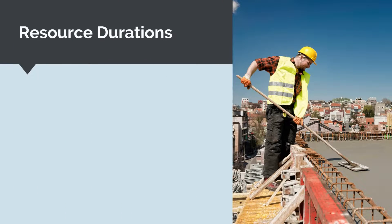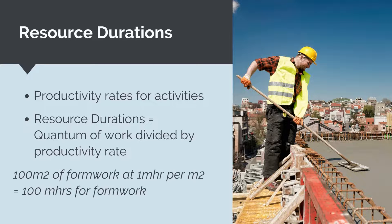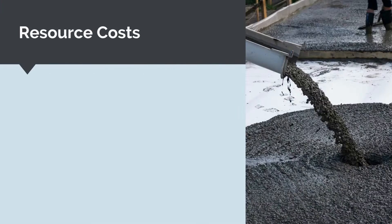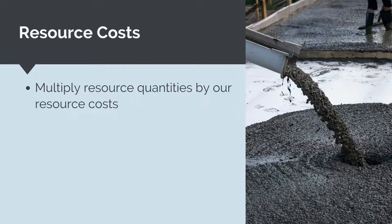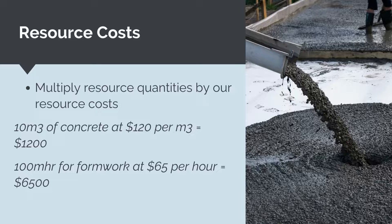Next, now we know what activities we need to complete and what resources we need to complete them, we need to estimate the duration we need these resources based on productivity rates. Our resource duration will then be the quantum of work from our bill of quantities divided by our productivity rate. For example, if we need to complete 100 meters squared of formwork at an average productivity rate of 1 meter hour per meter squared, then we need 100 meter hours for formwork. Then once we've worked out our resource quantities, all we need to do is multiply these quantities by our resource rates. If we need 10 meters cubed of concrete, then we multiply this by our resource rate of $120 per meter cubed to get a total cost of $1,200 for concrete materials. If we need 100 man hours for formwork at $65 per man hour, then our cost is $6,500 for formwork labor. We can then simply sum all these together to get our total activity costs.